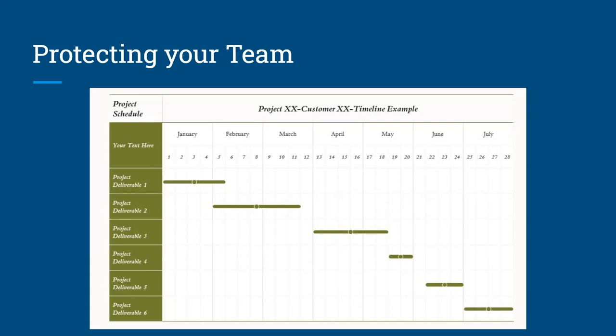So by using that projected, estimated workload for your team, you can tell your superiors that, Hey, we don't have time. This is how we scope things, right? Sorry boss, we don't have time to do this. We cannot do this. And in my, in infinity ward, this thing happens on a regular basis and like meetings where we want to improve our gameplay. We want to make stuff look nicer. A lot of the producers have this on hand, like handy on like they have it on hand. And right. When someone says, Hey, can we add this? They're like, no, we're not, we don't have time to do this. So as long as you're prepared, you have this on hand, ready to go. Your team will love you. They're going to love you for protecting them from having to crunch.